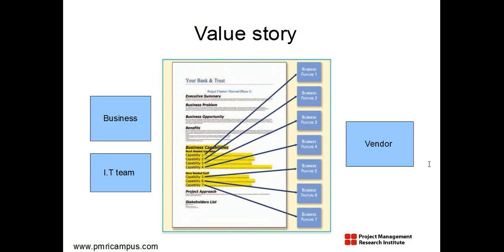Okay, then the next question is about lean. All those things are fine. So that is from the development side. Lean software development is for the development side. Customer may not be really interested there. How you develop the product is not the customer's prerogative here. But if you are using lean, then you'll be able to develop it faster at a lower cost, which translates into more value. Because what is value? Value is nothing but the returns divided by the investment. So by removing unwanted procedures, the denominator will shrink. That means you get better value. So returns will be the same, and the investment you can reduce by removing unwanted features, then you get better value.